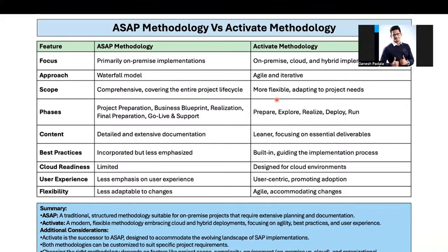With public cloud or less customization, no ABAP programs and all, certain things can be moved. But still, when it comes to SAP, for the partial movement to production and running the business for certain areas, we need to really find certain areas only where we can do it like that, because we have interlinked modules.